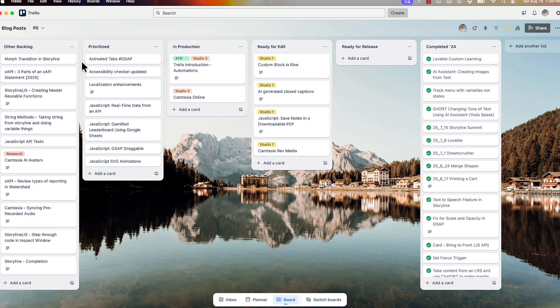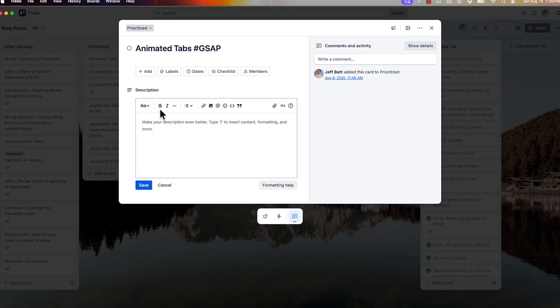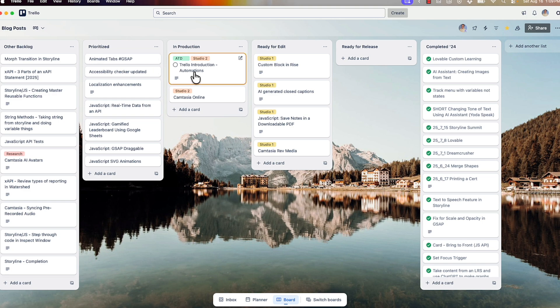Then I start to prioritize my task list. As a product manager, you go through and groom your backlog and pull out things that are important. I have my prioritized section where I start to put things up towards the top of what I want to work on next. As I start to work on it, I add it to the description — code snippets because I talk a lot about JavaScript and Storyline, any scripts or bullet points I want to cover in that video. Once it's finalized, I take a card and drag it over to production.